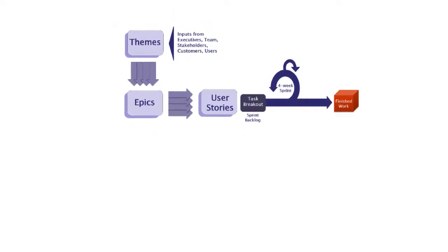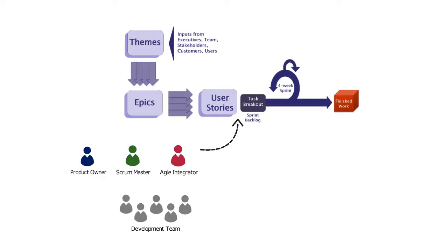Remember, as we move into the beginning of the sprint, planning meeting will occur, where the product owner meets with the Scrum team. They collaborate to create the sprint plan, which is followed by story point estimation and the task breakdown session. Once these activities are completed, development for the sprint may begin. So, from here, the sprint team performs development and testing of tasks.